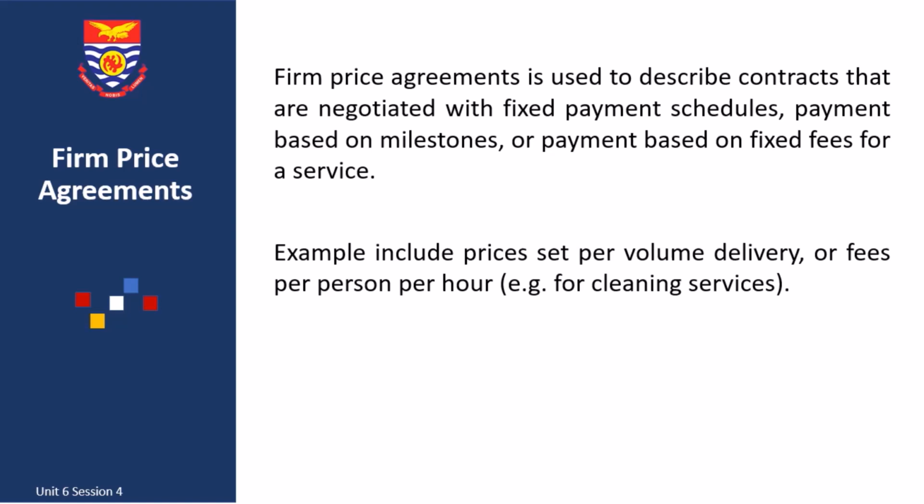Under such a contract, if the supplier finds that performing the contract is more difficult or costly than anticipated, he or she is obligated under the contract to deliver the product or to receive no more than the contracted price. So the price charged here, the fees paid here, are fixed. Whatever we've agreed on is whatever we are going to pay till the end of the agreed period.